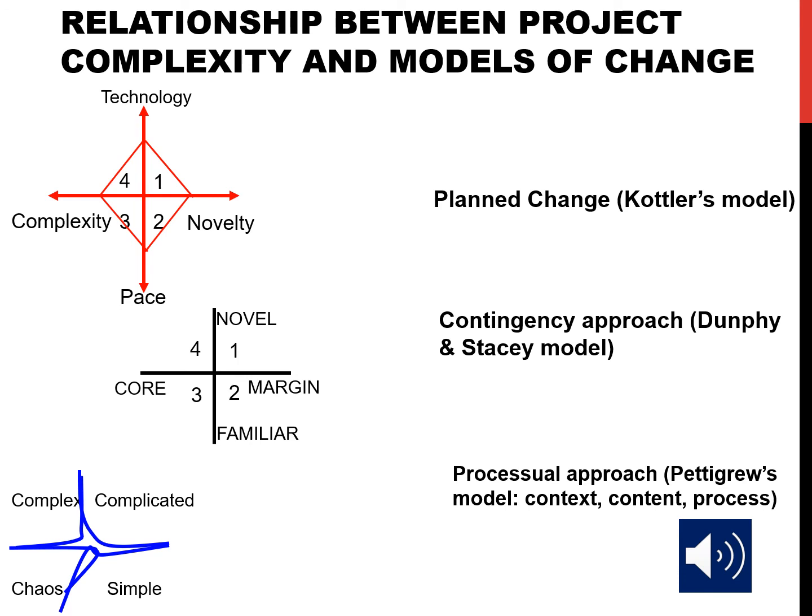So in a processual approach, simple linear recipes of change must be challenged because they won't be useful. We use processual approaches when power and politics are key to the success of the project. Processual approaches need to be used also in the case of long-term projects, because in long-term projects there will be changes in part of the process, in the goals, or in the resources, or in the support of the project.